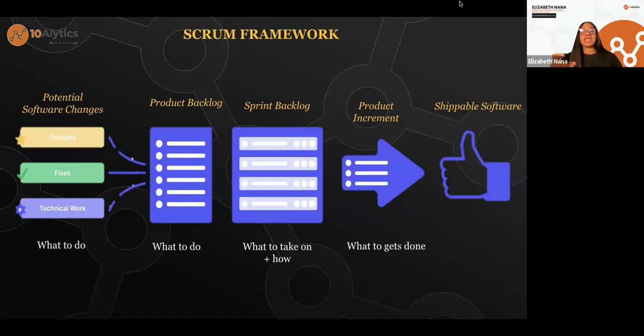So being able to prioritize and pick what is most important and knowing exactly what the capacity of your team is, okay? You're not claiming that, you know what, I'm the best product manager or I'm the best project manager, I have the best team, I'm the best business analyst, so we're going to do all 70 at once. It's not possible, all right? So you just want to pick the most important 5 or the most important 10, and that is what makes up your sprint backlog. And now from your sprint backlog, we have what we now call product increments.